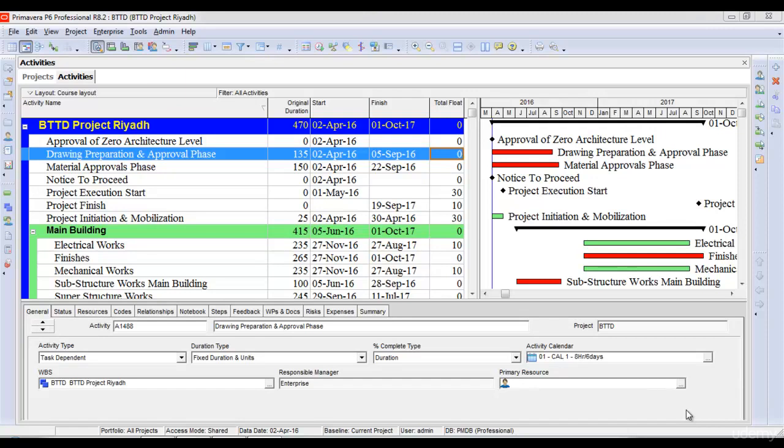In this lecture we are going to talk about schedule log. Schedule log is one of the important things in primary basic scheduling. Every project is accompanied by its schedule log. Whenever we schedule a project, a new schedule log is created along with the project.